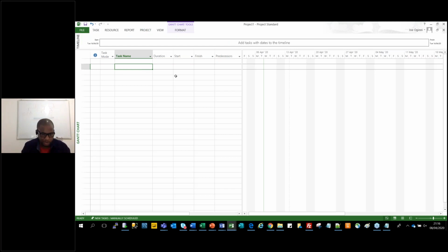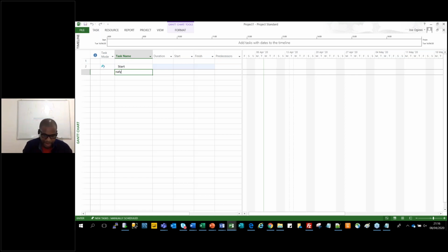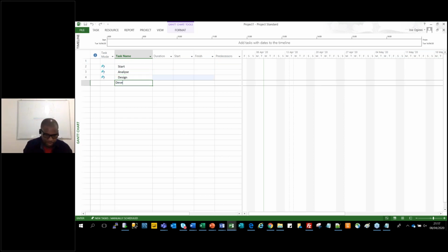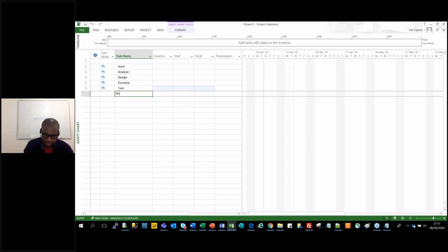Assuming you want to set up a project, I want to start a project, so I put Start. Just watch me as I do. Put Start, then press Tab on your laptop, the arrow down, and it goes to the next line, you don't need to click. Start, then Analyze. I'm just going to go with the project life cycle, for example. So after we start, we analyze, we design, we develop, then we test, then we deploy, then we finish.